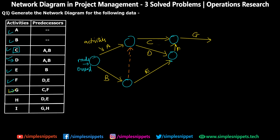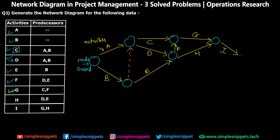H requires D and E together — D and E already meet at a node, so H can start from there, resulting in another node. For I, G and H are required. G ended at one node and H at another, so instead of separate nodes I connect them together — G to H's node or the other way, both are fine. So G and H combine at this node, and now I can happen — I is the last activity, creating our final node. So this was our first network diagram. The only unique thing here was the dummy activity; the rest we already covered in the previous video.